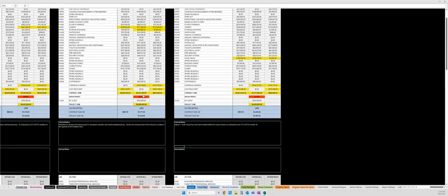And then as you can see, the margin has reduced as a percentage from 24.57 to 23.13 because our option did not have the same markup as the average project size. And so internally, I might say profitability percent has decreased due to AV package being marked up at 10%.